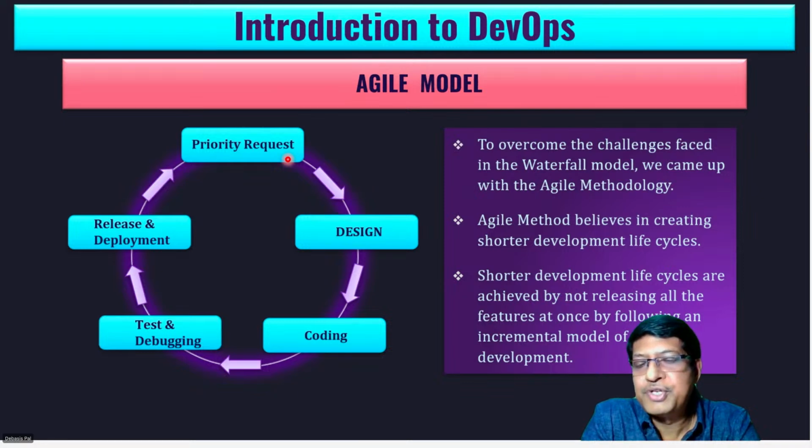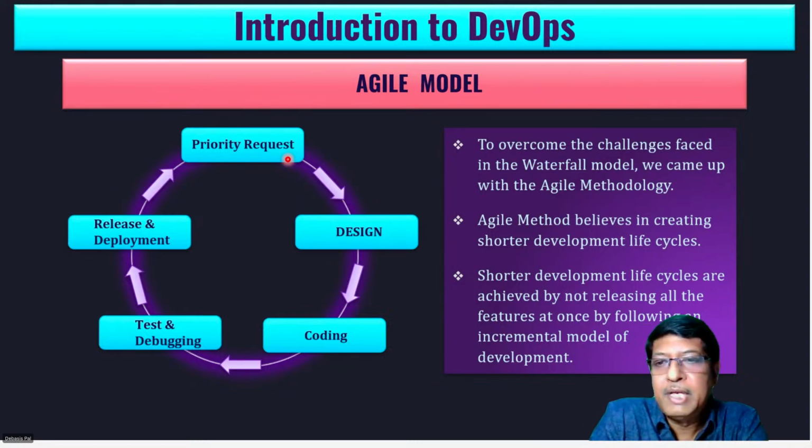I have to do a lot of assumptions and get these risks, assumptions, issues all captured and approved, so that the customer gives a nod that, okay, I accept the risk. So it is a risk that I understand. If I can do that, I am a very successful project manager, because I am delegating that risk and transferring that risk to the customer. I am not taking that risk on my shoulders. I am saving a lot of harassment, a lot of money for my company.